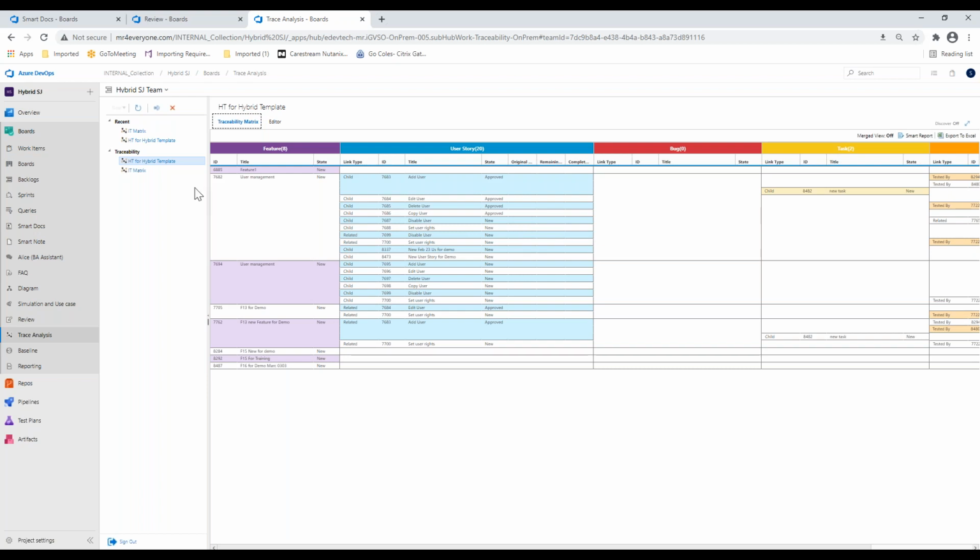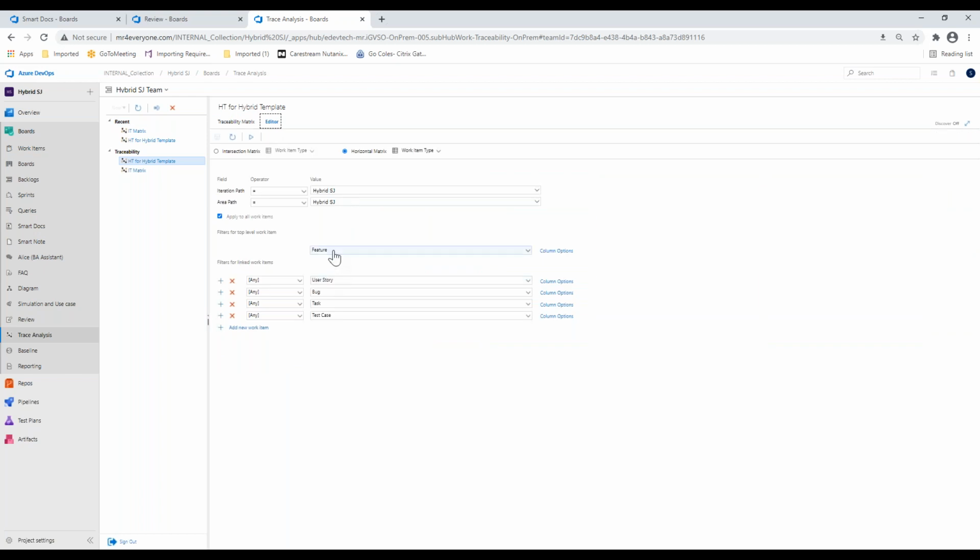So just to add to that, you can create end-to-end traceability all the way from, say, if you're doing Agile, from epic to features to stories to test cases to bugs. You can also do it from test plan to test suite to test runs to test cases, the result of the test case, and also at the step level, whether it passed or failed. So you can get traceability through broad spectrums of your information from both the work item perspective and the test management perspective.